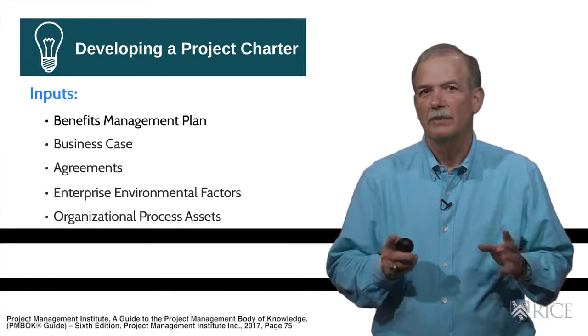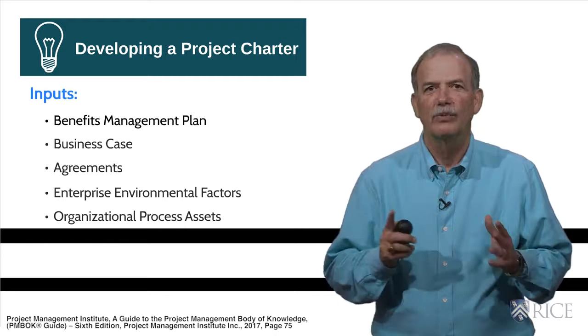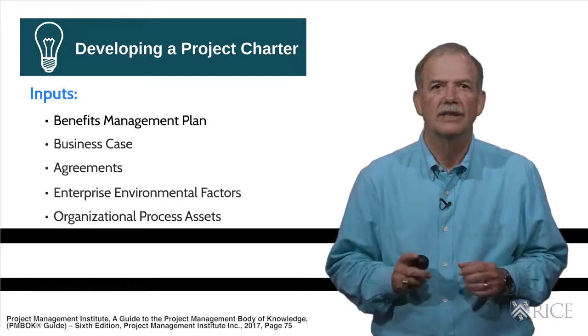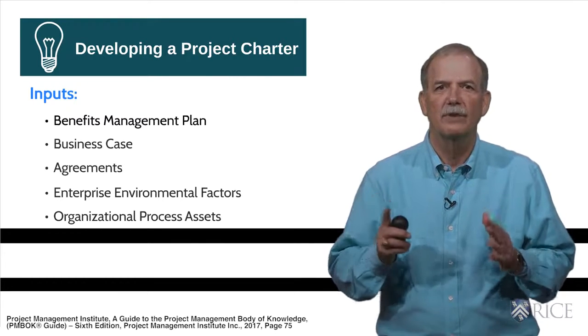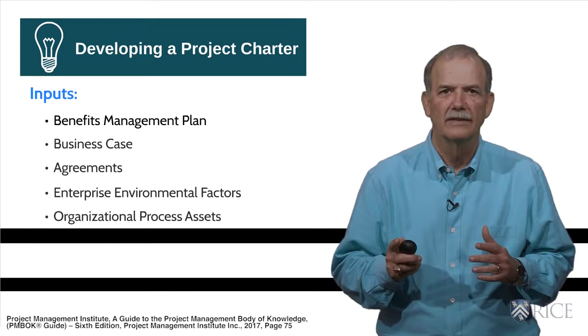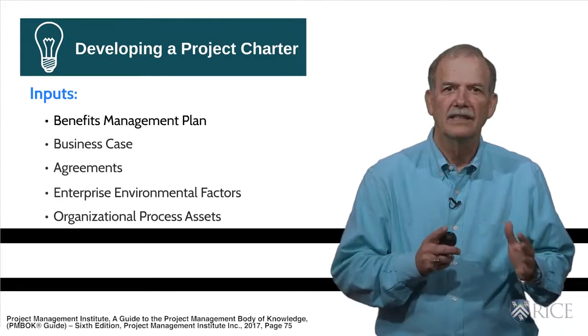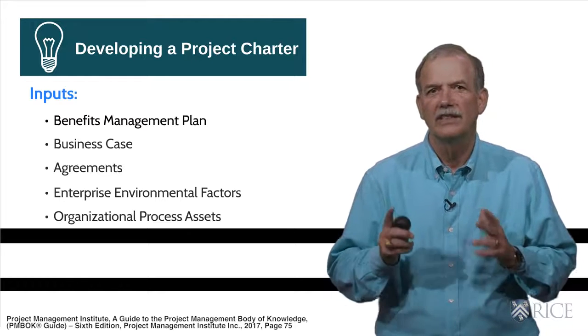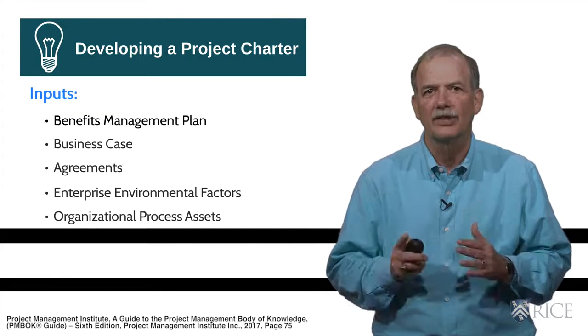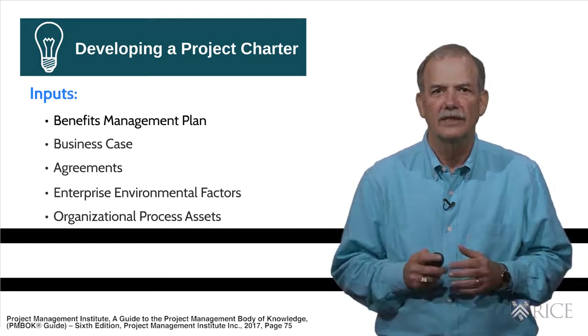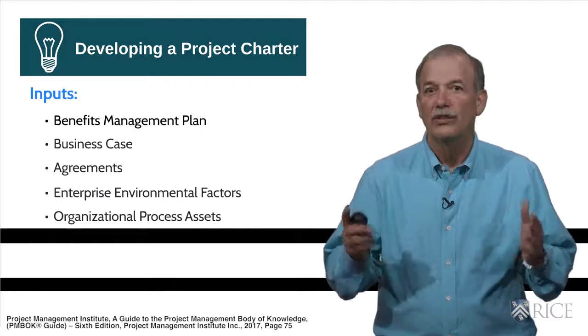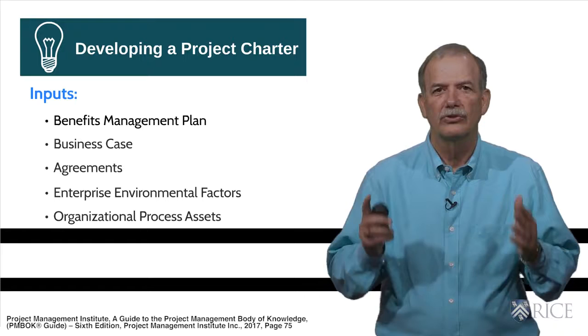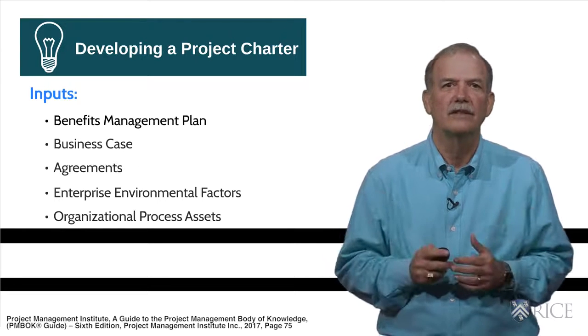The benefits management plan, a description of how and when the benefits of the project will be delivered, and the mechanisms that should be in place to measure these benefits. The business case for the project, which is a documented feasibility study used to establish the benefits of the project and to justify further activity. Why are we doing the project? What are the strategic and business benefits of delivering this project?